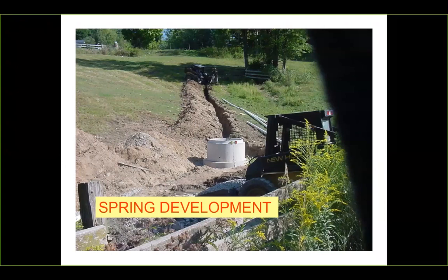So there's always been debate about specifications, implementation requirements, and standards. Your standards and statements of work are going to be the two governing documents on how standards are applied. Your site-specific specifications and site-specific items of work or implementation requirements are going to be the certified documents that tell you and the landowner what is required to implement in order to meet that conservation practice standard.